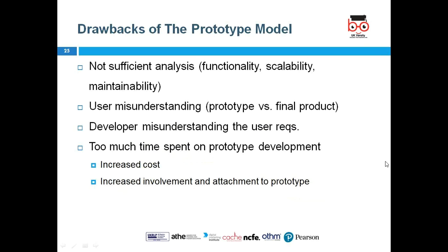Drawbacks of the prototype model: not sufficient analysis, because you will not have sufficient opportunity to analyze the functionality, scalability, maintainability, and many things. The user can also misunderstand the prototype as the final product. Makes sense?